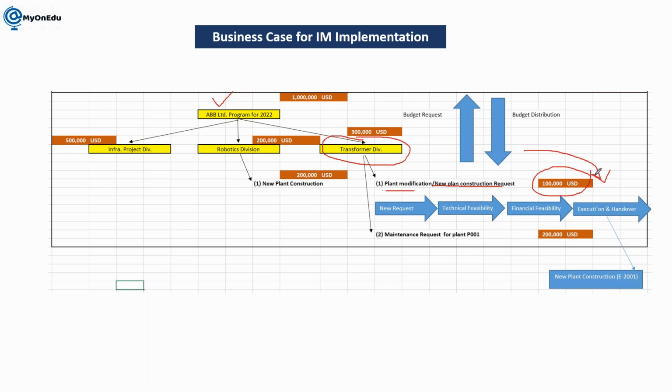So this means 80,000 will be controlled further from a budget perspective. First you are going with the appropriation request. Once it is approved, then the same appropriation request will be converted as a project in PS. So this is the process here. First we have the program definition, then the top level position, then the last level of position.